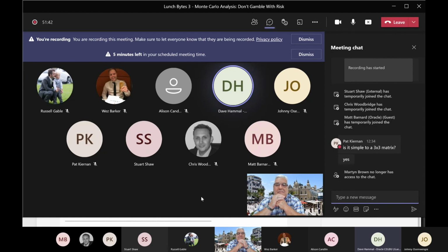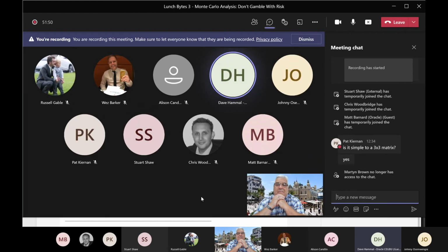And the benefit of doing it from the activities page the other way around is you can use codes or filters, groupings, etc., to quickly go to the particular activities that might be impacted. So if you've got a weather risk, let's say for high winds, and maybe you've got a code in there that says what is the working height of your activities, and it's all those crane type work, right? Things that are above a certain height. You can quickly type in that code, use the quick filter, or set up a proper filter, and then map the risk to those activities in that way.